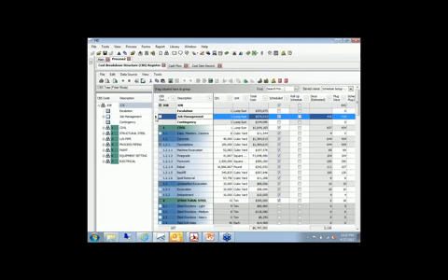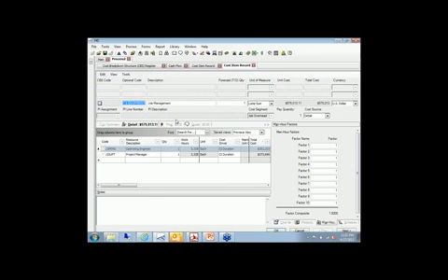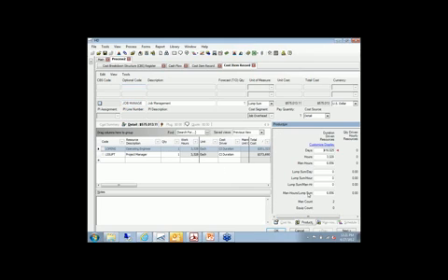Likewise, if we look at job management, in our cost model, we may or may not want to borrow the schedule for that, but in either case, we've got things like engineers, project managers, maybe supervisors, secretaries, etc., that we know how much they cost us on a unit cost basis or an hourly basis or a monthly basis, but we need to know how long they're going to be working. Right? So in this case, we're going to show you an example of where those work hours, in this case 3,300 work hours or 416 days, are coming back into hard dollar from Primavera. So as the schedule gets longer or shorter, back here in our cost model in the estimate, our hours for our engineers and project managers are going to go up or down accordingly. We don't have to worry about it.